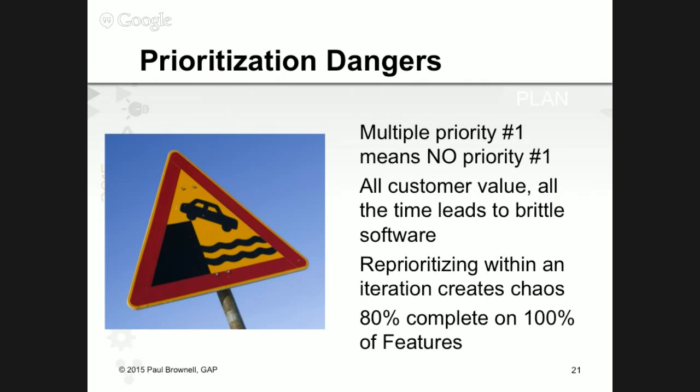But if you set a plan and then 3 days later the plan changes, and 3 days later the plan changes again, it upsets the cadence and the sequence and the productivity. So set the near-term priorities very clearly. The priority for next month, you don't have to worry too much about it. The priority for this sprint, make sure it's really clear and that you've put enough thought into it.